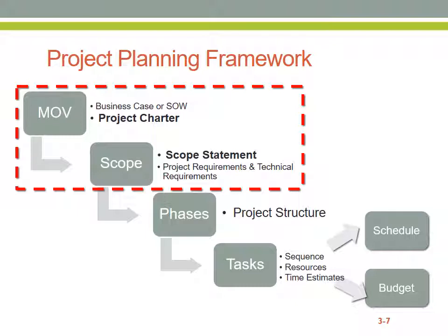Once we have the scope statement and the project requirements, we can think about how to develop the schedule for the project, and that includes selecting the appropriate project structure, which can be waterfall for smaller projects, which can be any kind of iterative formats for larger projects, from a Scrum format to a Kanban format to anything in between, any hybrid waterfall iterative format as well, depending on organizational preferences.